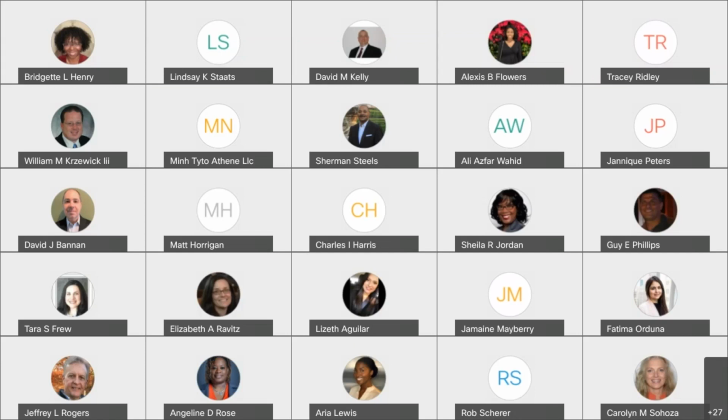Management of project knowledge exists on 3 levels, and I want to see if you can remember what they are. Here are your choices. Option 1, technical, administrative, and procedural. Option 2, individual, project, and organization. Option 3, scope, schedule, and budget. Option 4, practical, theoretical, and actual. Which one is it? Individual, project, and organization. Thank you. Very good. Okay, next question.